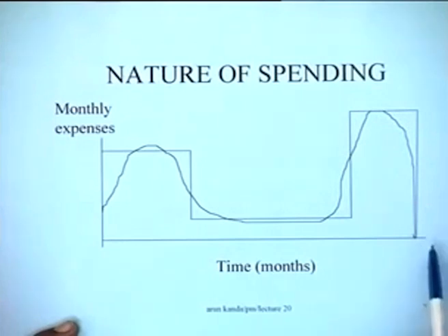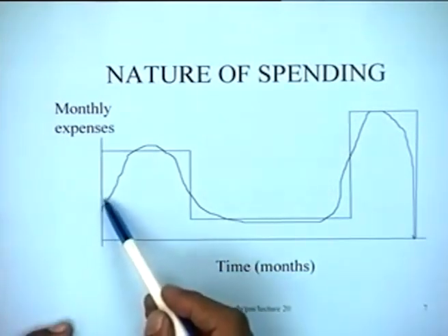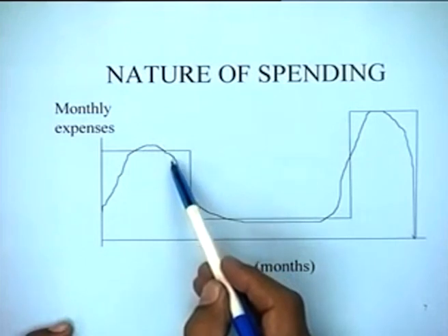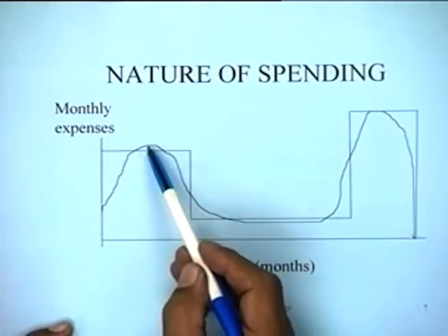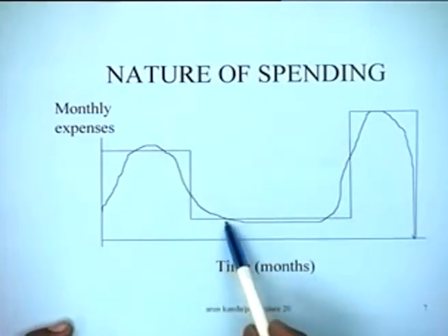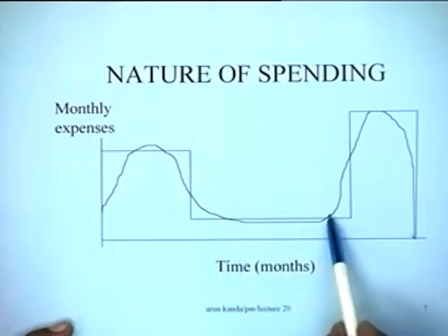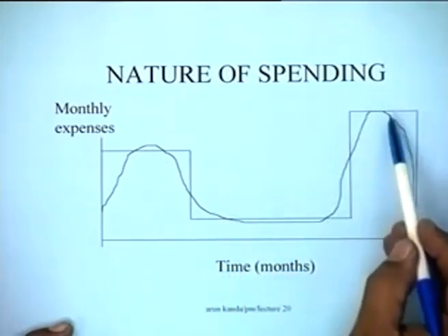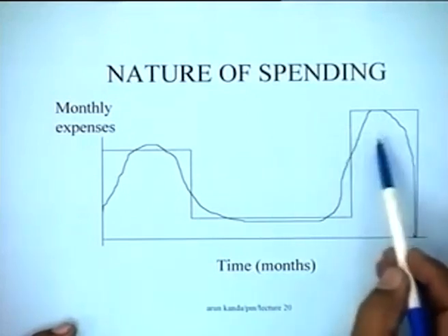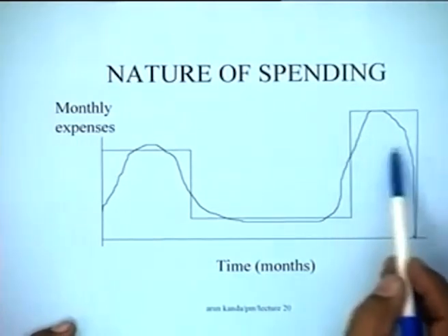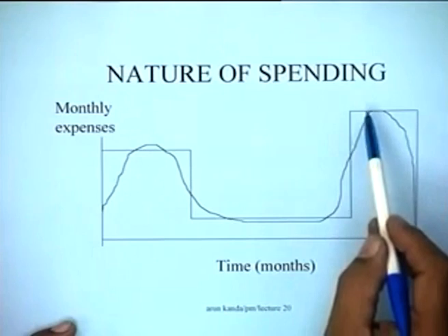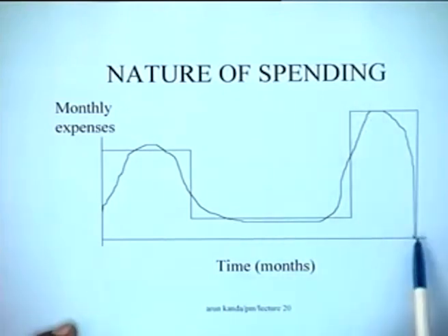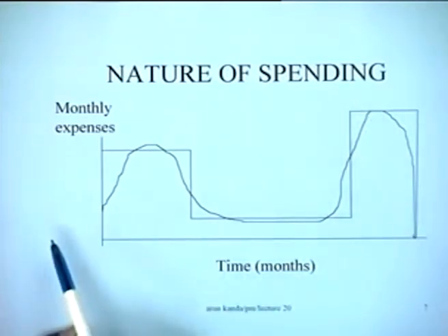This is what happens, right? So one can expect that in a typical activity, the pattern of expenditure will show an initial peak, a common period when the activity is going on, and finally a situation when there would be a final settlement of expenditure with all the contractors. So all the money has to be shelled out during this particular period, and this would be the nature of the activity.